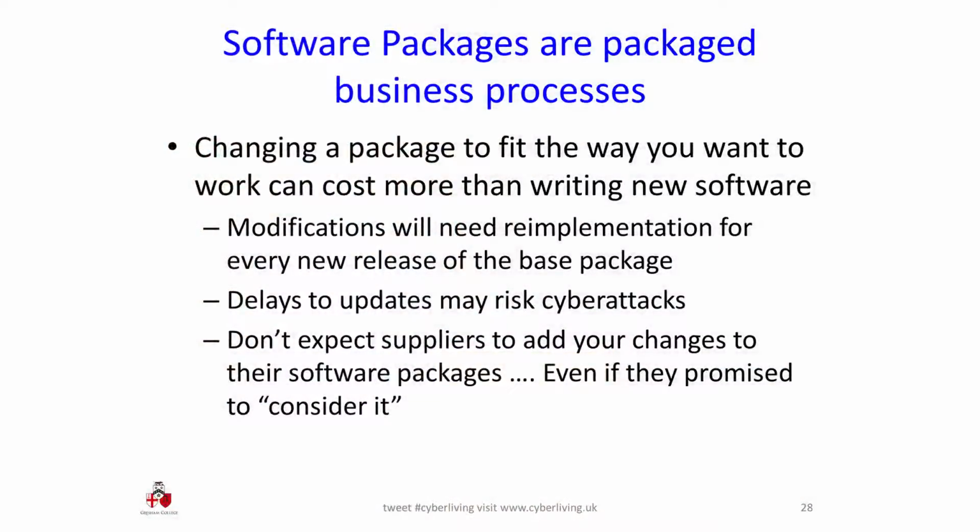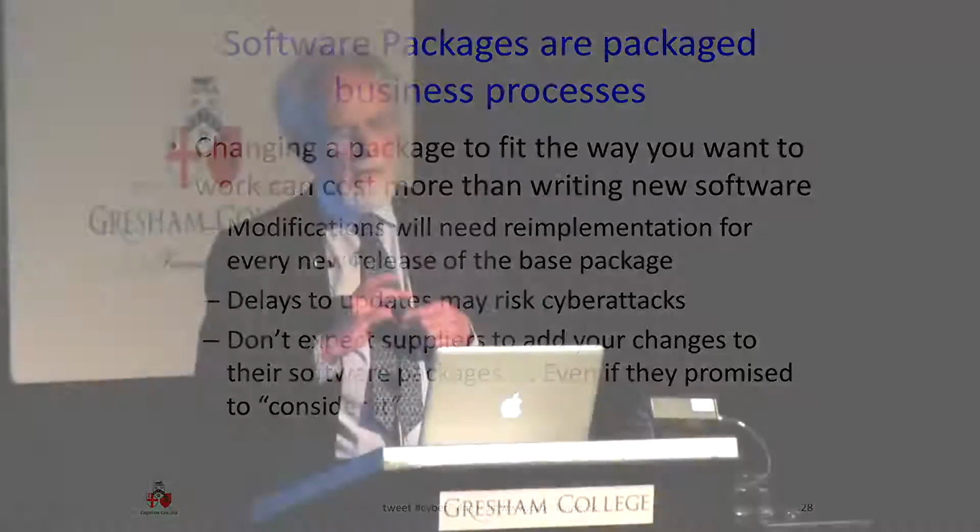And the corollary of that is that if you decide that the way you're going to implement your new processes is to buy a package off the shelf, which most people want to do because it's seen as a lower cost thing to do than building a bespoke, a custom system, then what you're doing is buying business processes off the shelf.